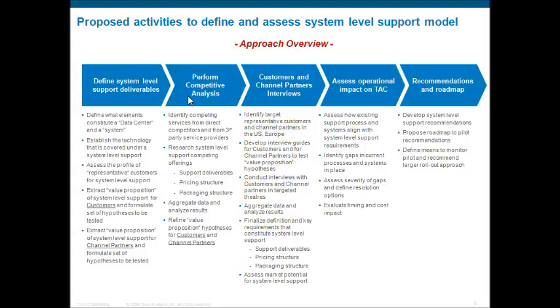So if you were to describe how you're going to do this project in 5 or 7 major steps, what are they? If you had your 30-second elevator pitch, in this particular project, we're going to say, well, the first thing we're going to do is define what a system solution is. Then we're going to do a competitive analysis, and then we're going to interview our customers and channel partners to make sure we understand their needs. And then we're going to understand what the offering is and assess the operational impact to the organization in order to meet those needs, and then we're going to develop our recommendations, right? In 30 seconds, I'm able to define the 5 or 6 major steps of the project and communicate that out to the organization.